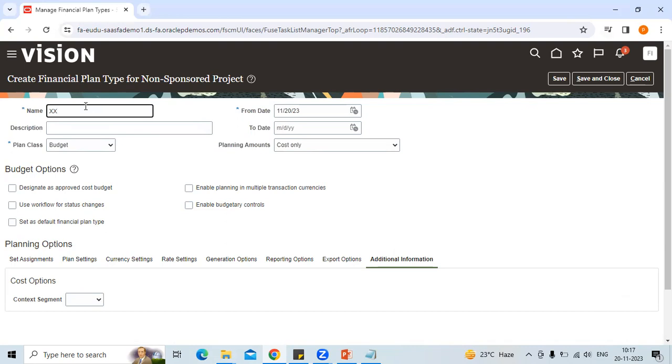No, Ash. Okay. Grant management is a separate module altogether. It is a separate product. If you have an NGO, there will be a lot of awards you will be getting from the government. There will be a lot of government funded projects. To track all that specifically, you have the grant management module. Similarly, here also, we are not discussing grant management, but we have a similar concept of the sponsored project. If we select the sponsored project, it is already funded, so you don't have to create the separate budget, and those controls and all will be slightly different for them. But in our scope we will only talk about the non-sponsored, because